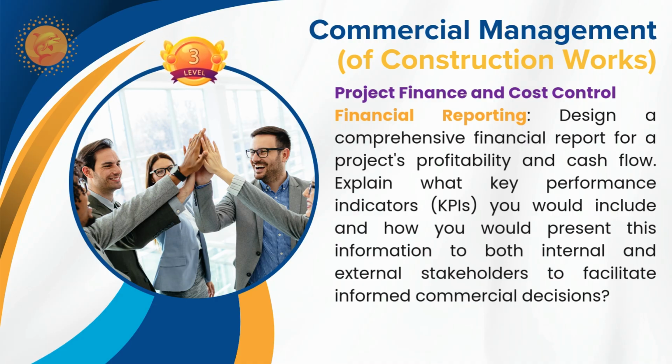Monitor and control. So in order to have better understanding at management level, these key performance indicators, KPIs, are used. Some of the things like cost performance index, schedule performance index are very standard.